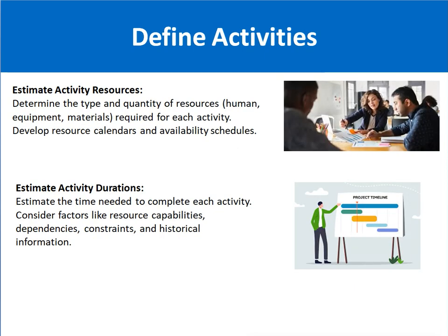Next is estimate activity resources. That means you have to identify how many resources are required to complete any particular activity. Resources means human resources, any hardware, material, equipment. So we must identify these and also develop resource calendars and availability schedules as well.